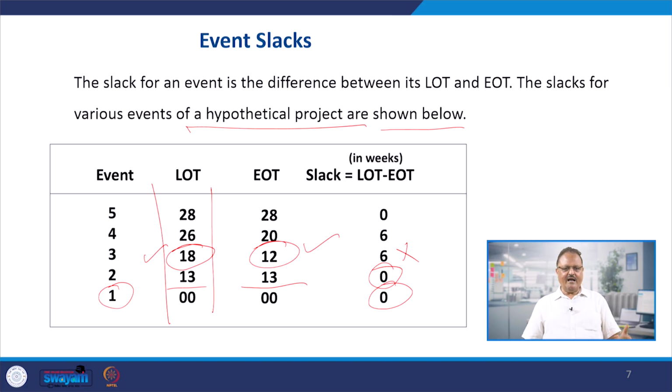And when you want to have a higher amount of input resources, in that case your cost increases. So your objective is to develop a critical path where there is no slack, no cushion for delays of the project, and maybe the cost is going to increase. We are ready to pay the increased direct cost. Indirect cost is not going to be affected. That's only linked to the time.